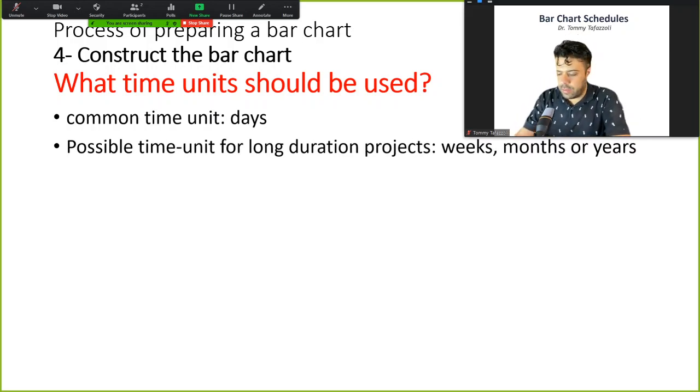And sometimes, however, you could use smaller time units. Sometimes you could use hours. That is the case usually for equipment rentals. Sometimes those equipment rentals are expensive, and you could go to half a day, or you could go to increments of 4 hours or something like that. That depends on how the company who rents it wants to rent them out. But it is possible that you have time units that are smaller than a day, though it is not common.